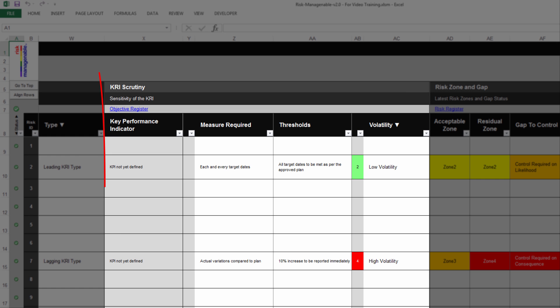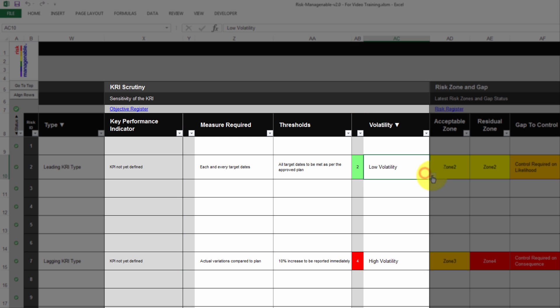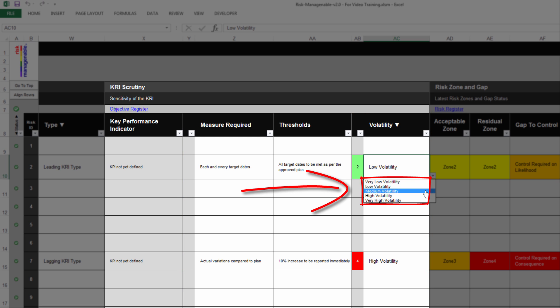The section KRI Scrutiny is where you record what will have to be scrutinized for the KRI. The column Key Performance Indicator is automatically extracted from the Objective Register tab for the Objective at Risk — this is useful since there is a link between Key Performance Indicators and Key Risk Indicators. The other columns are for recording the measure required, the thresholds to monitor closely, and the known or expected volatility of the KRI, where you select one of five levels from very low to very high volatility.